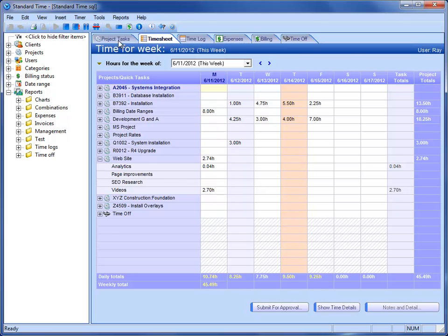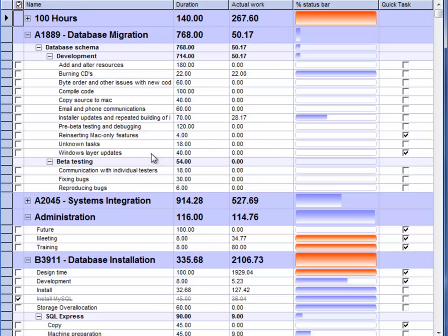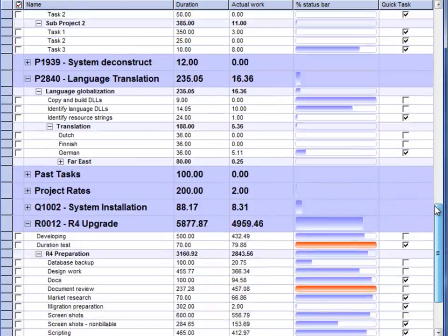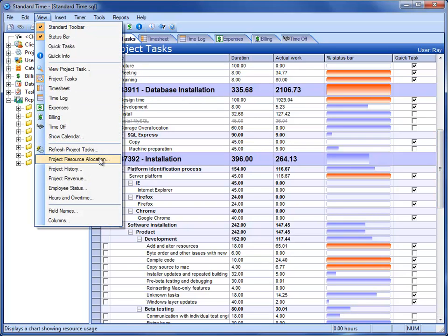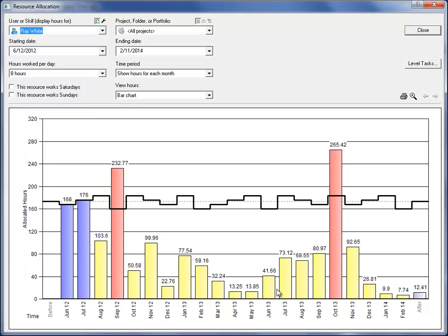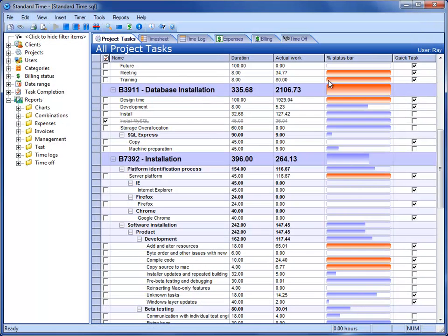It turns out that if you go over to the Project Tasks tab, you see a series of project tasks. Now, I didn't go into this view on the last video, but it was empty on the other database because we were not using project tasks at all. So you do not need project tasks to do employee availability. But in this case, we've got some, and you can scroll through and see all of the project tasks which have start and finish dates, and those dates feed into this resource allocation chart to tell when the person is scheduled to work. So they may be working on a task one month but not another month. So that's how the more advanced resource availability and resource allocation occurs.